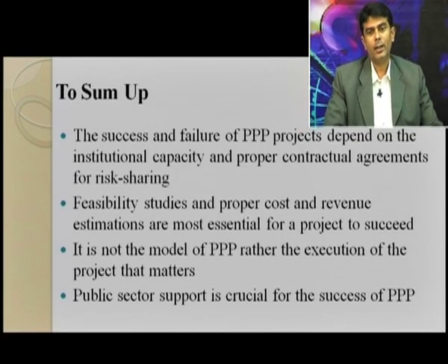The feasibility study and proper cost and revenue estimations are most essential for a project to succeed, especially in infrastructure development. We have seen in the case of road construction in Tamil Nadu, the second example, that the feasibility study and cost and revenue estimations were much more practical compared to the first case of Delhi Metro projects. So, it is not the model of PPP but the execution of the projects that matters a lot.